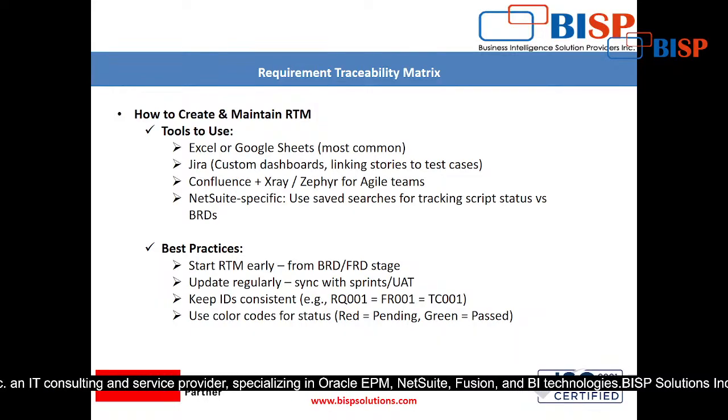Yes, so what are the best practices? You should develop the documents parallelly, side by side, because once you complete the BRD and the FRD, at the same time you should start the requirement traceability matrix.